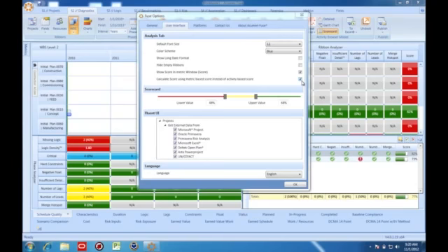The metric-based method typically produces higher scores, as a single task would need to fail in multiple areas simultaneously in order to receive a very low score. Acumen includes both scoring methods to allow project teams to determine how best to assess their individual portfolio or schedule health.